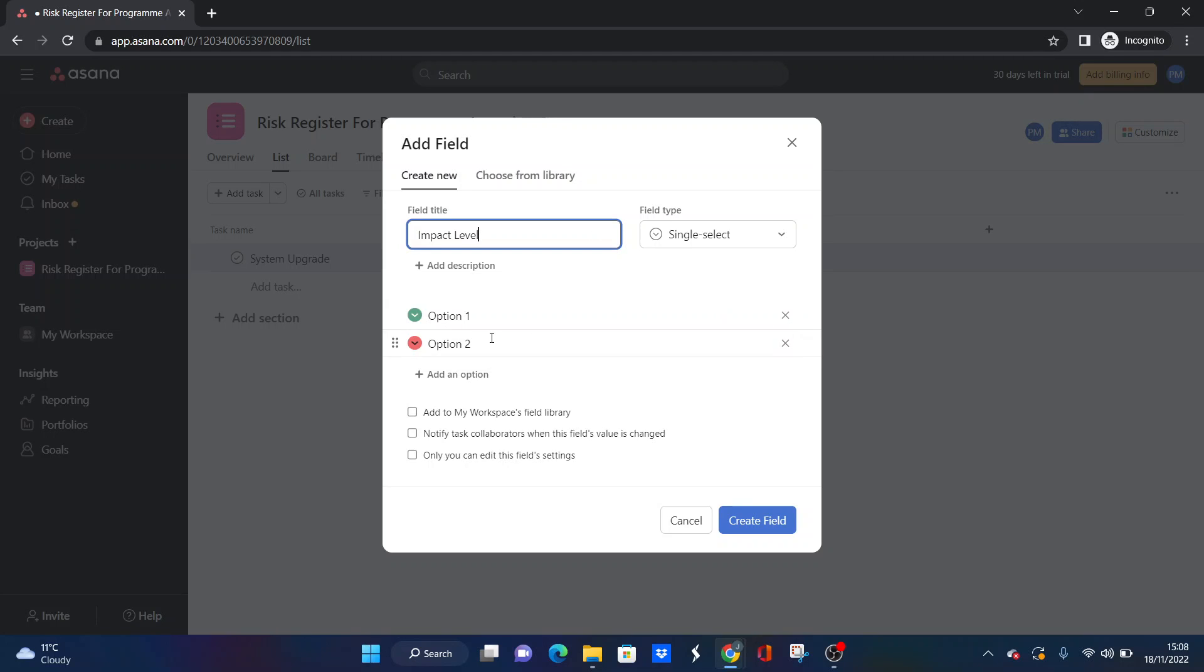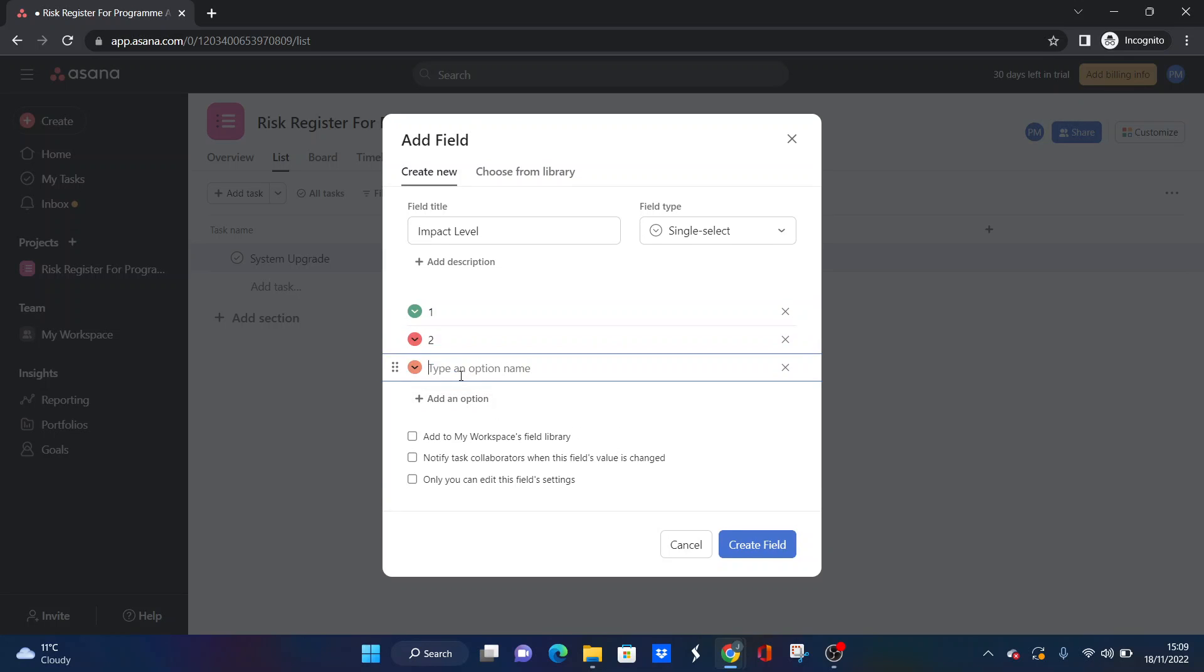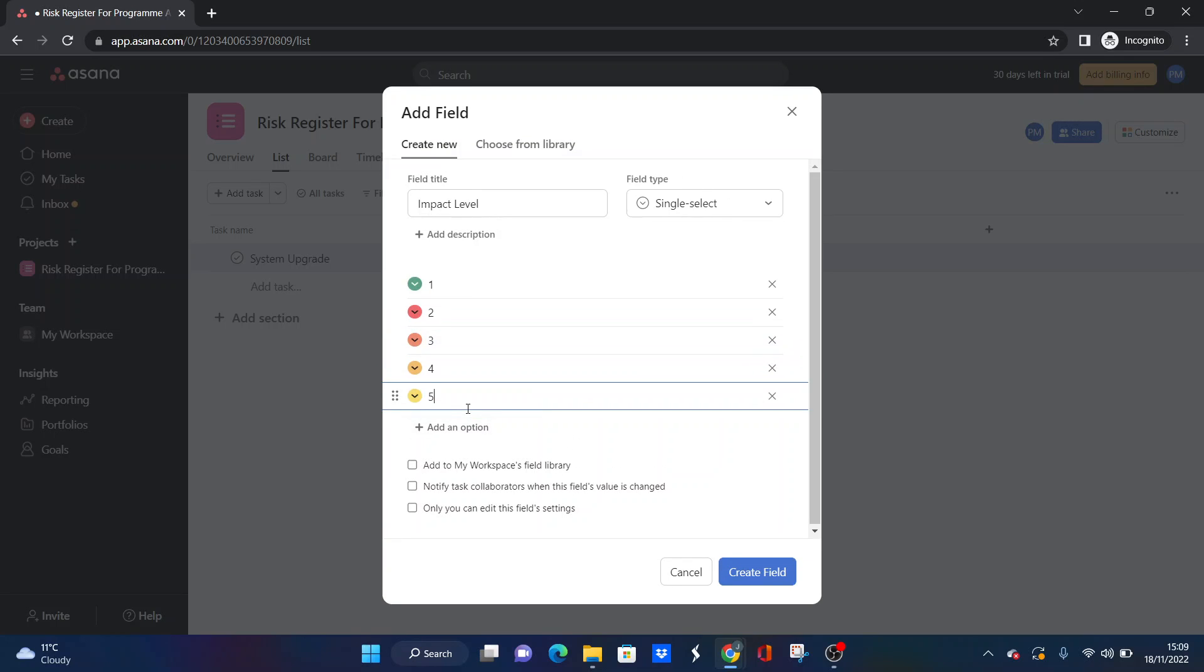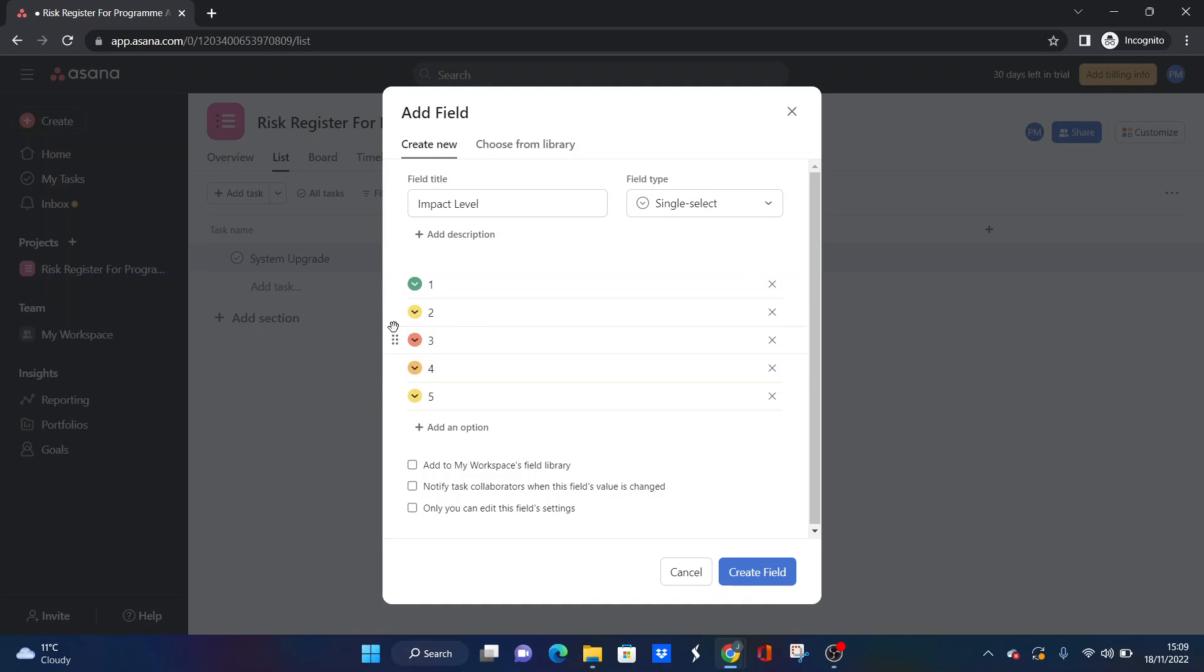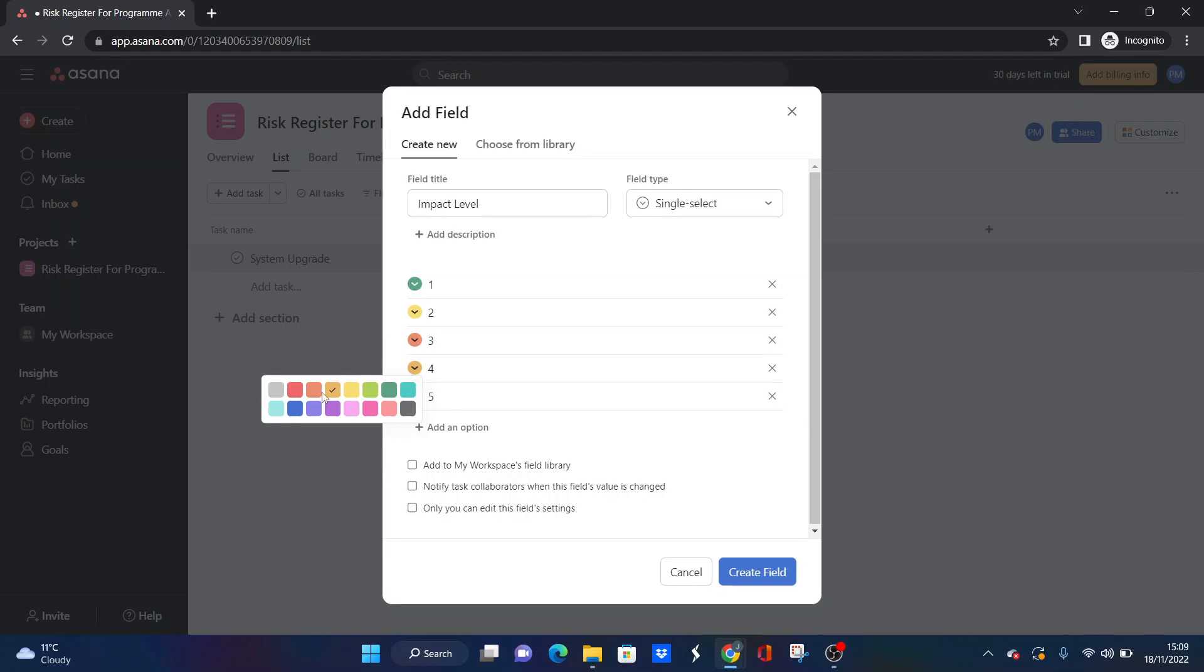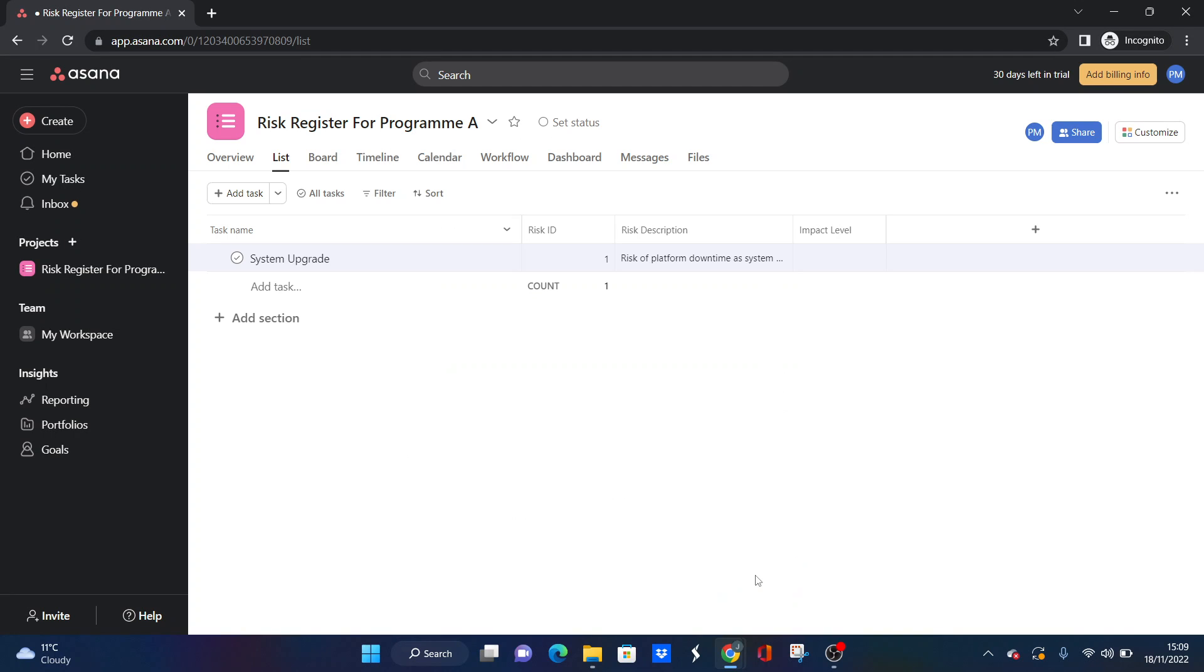I would suggest going from one to five with five being severe and one being not so much. What we're going to do here is we're going to add the different options. We are literally just going to remove those and put just one, two, three, four, five. And the particular coding here, we'd probably want this one to be a yellow. We want five to be red. I'm just trying to get some kind of scale here that reflects the severity, essentially. So that's what we're going to do here. We're going to press create field.